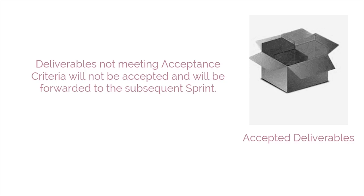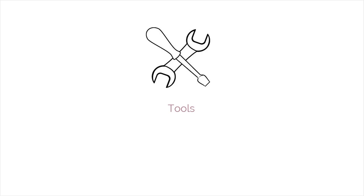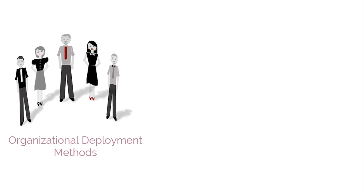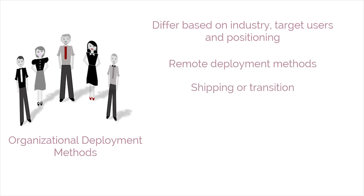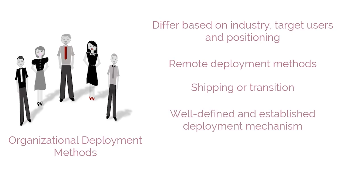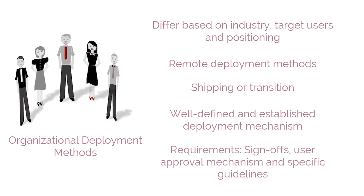Now that we have the inputs ready, let's see what tools are available to carry out the process. In the ship deliverables process, the main tools involved are the organizational deployment methods. The deployment mechanisms of each organization tend to be different based on their industry, target users, and positioning. Depending on the product being delivered, deployment can take place remotely or may involve the physical shipping or transition of an item. Because deployment tends to involve a high level of risk, organizations normally have well-defined deployment mechanisms with detailed processes in place to ensure compliance with applicable standards and quality assurance measures. These might include sign-offs by specific management representatives, user approval mechanisms, and guidelines regarding minimum functionality for a release.